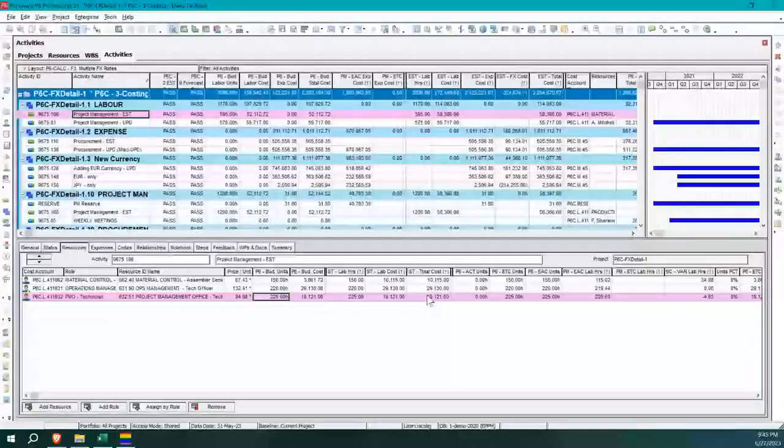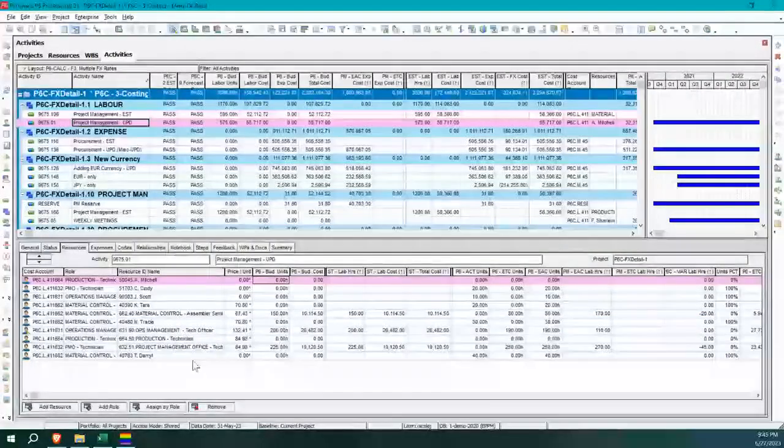Now, where this can get more complicated is, of course, as we discussed in the currencies. But it can also get more complicated on the updating. Okay, so let's look at this example. So this is the same activity, but it's been updated. So this activity actually started to receive, in this example, timesheets. So you may have your team actually putting in timesheets in a different system, and we could read that data in. So in this example, it was in an integrated environment, but it could come through Excel. It doesn't have to be an integrated environment.